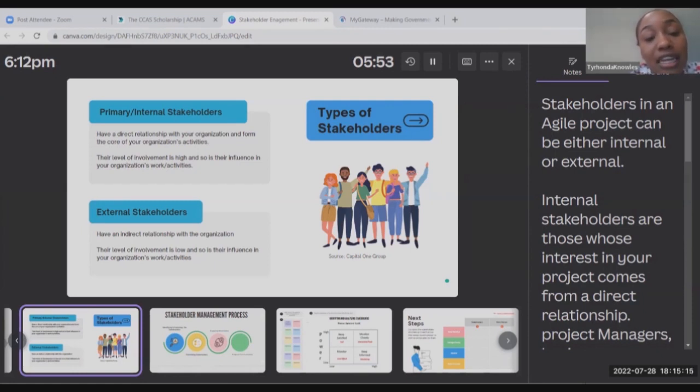So during those engagements, after we got to the point of developing the application, we had to engage the Immigration Department to inform them of the change in how this certificate will look, and to get acceptance from them in order for them to accept it as an input document for their agency.